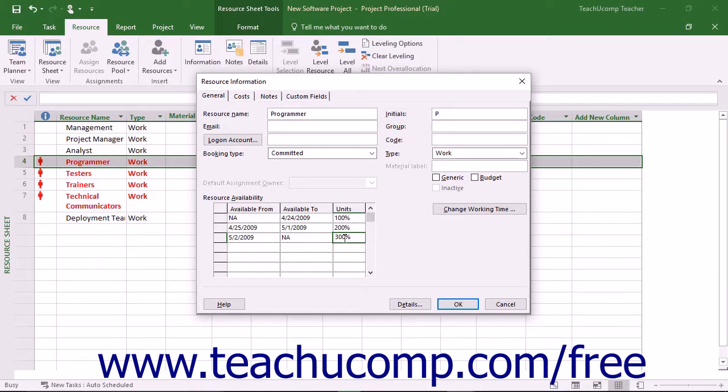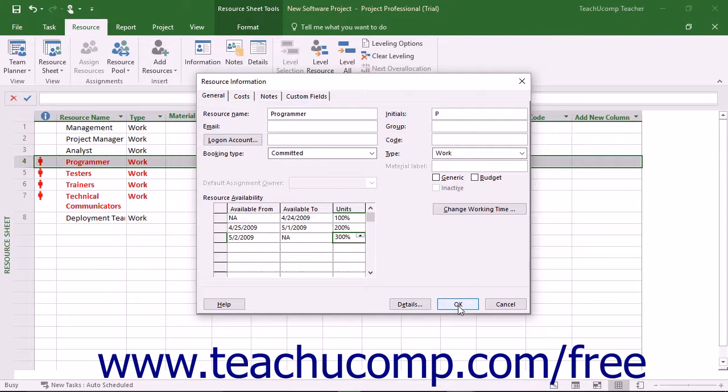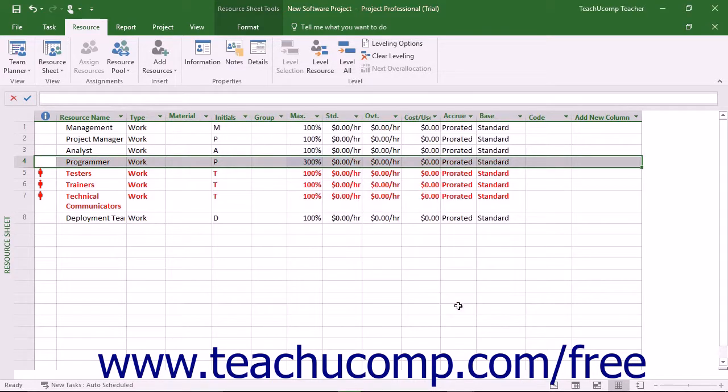This lets Microsoft Project accurately schedule the work based on the Resource Availability. After setting the Resource Availability in this dialog box, click the OK button to set the new Availability Rates.